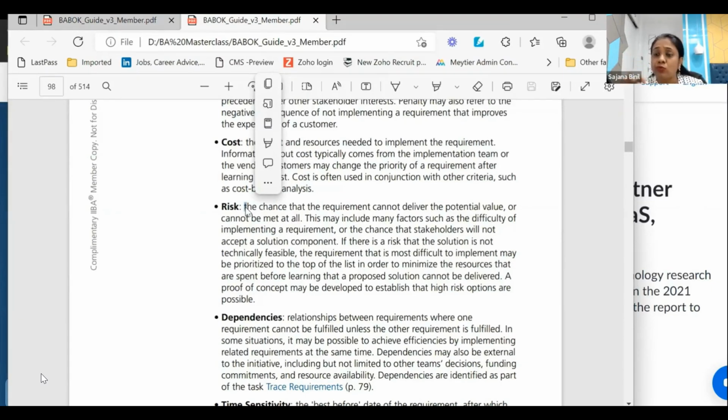Now, that same business rule might be used across 10 other screens, or 5 other screens. So if I change that business rule at one place, it is incomplete. I need to go ahead and change it in 5 places. And changing it in 5 places needs an extensive round of testing to see that nothing else is breaking. So in those scenarios, I used to highlight it to him and leave it up to him to decide.